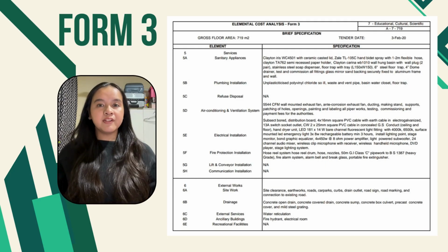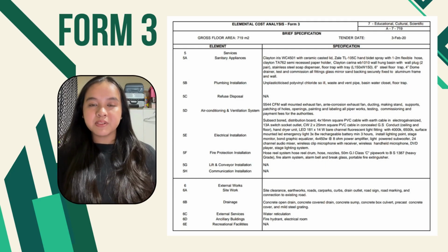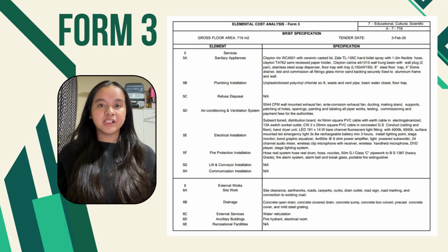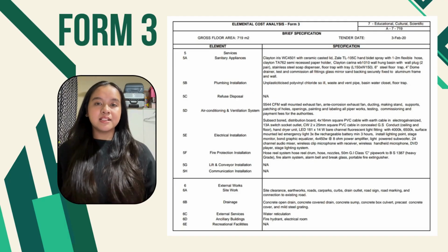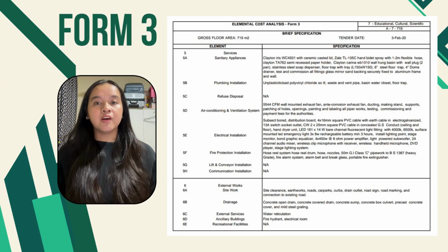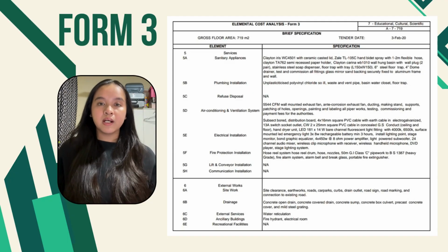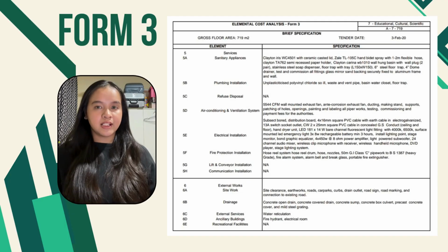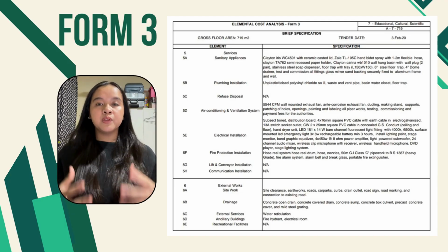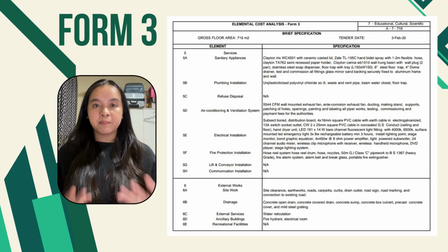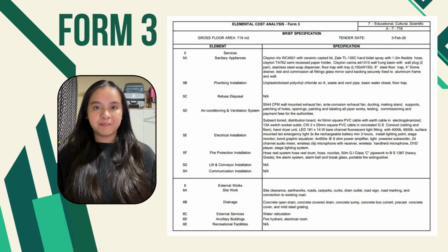Services involved in the mechanical and electrical systems such as plumbing, electrical wiring, lighting, ventilation, and fire protection. This system ensures safety, comfort, and compliance with the building regulation. Fifth is the external work, which covers the site preparation, drainage, road, car park, and the connection of utility. Since our project is in a rural location with limited access, these works are essential to support the overall development.